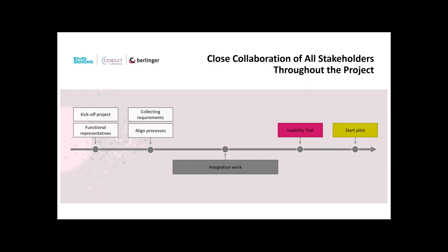And this was actually not done during an actual clinical trial. This was done in what I almost would call fake shipments, but also working with loggers in mimicked sites in order to test the whole process.